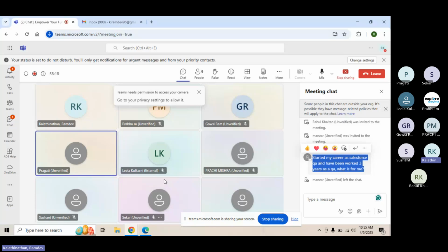But for now, all that you need to understand is if I develop something in a particular platform, there are other platform staging environments for me to test it to make sure that this is really going to work for my customer finally, and then only I'll go live, right? So getting back to the original question, for each and every module, I'll have to sum up the efforts and then say probably this is going to take 1,000 hours. Then what is the per hour cost that I'll have to charge the customer? And I'll have to come up with an estimate. As simple as that. This is how fixed bids actually work, right?